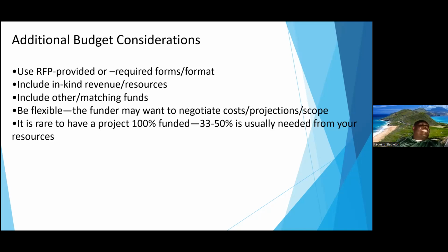And so you could always get assistance. And whatever assistance you get, whether it's duty free, or they're going to help by giving you the venue for free, put down the cost of what it would have cost you if you had to pay for it, and that is what you're going to get as your in-kind.